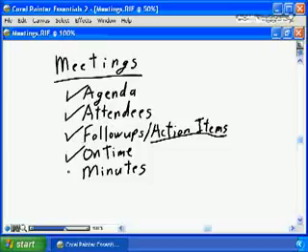Make sure that everybody is aware of the conclusions reached in the meeting. Make sure everybody is aware of the items discussed, and that everybody takes the same vision, the same message, the same conclusions away that the meeting reached. And do that through well-documented minutes, and ensure the minutes are published hopefully within 24 hours of the meeting's conclusion.